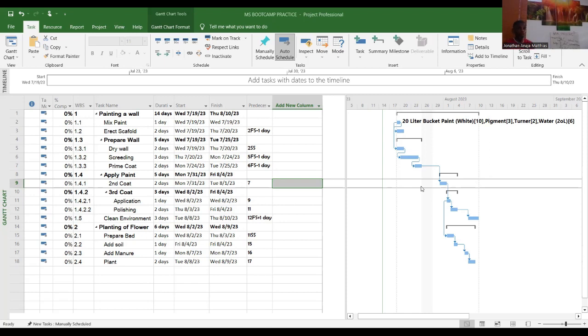It's possible to have finished the project but still be owing. So the actual cost, the money I have paid out, is 400K, but the money I am supposed to pay, my budget at completion, is 600K. So the accountant will need to know the estimate to complete: 600K minus 400K, so my ETC is 200,000 naira, even though it was supposed to be 100,000 naira. So the 100,000 naira will be treated as variance.